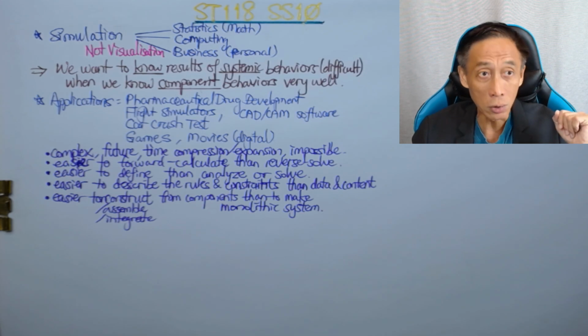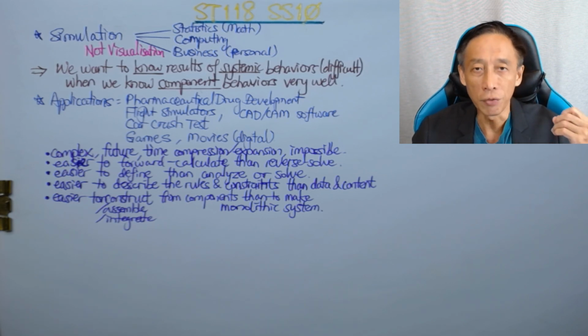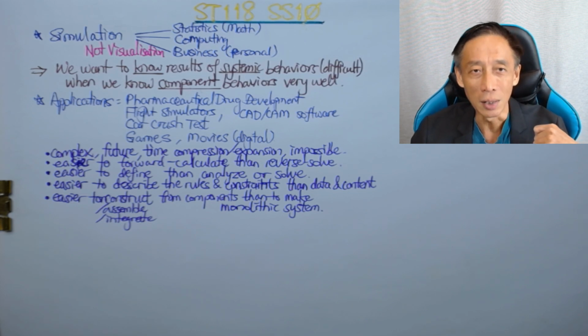If we say 621, that's higher than 600 by our building standard. So let's do something. In that sense, we gain a better feel. And then it will be documented, so that if somebody says no, changing it will drag us back another 2 months and we have to pay liquidated damages to the customer, we can say no, we cannot. So let's go ahead, and this will be documented.